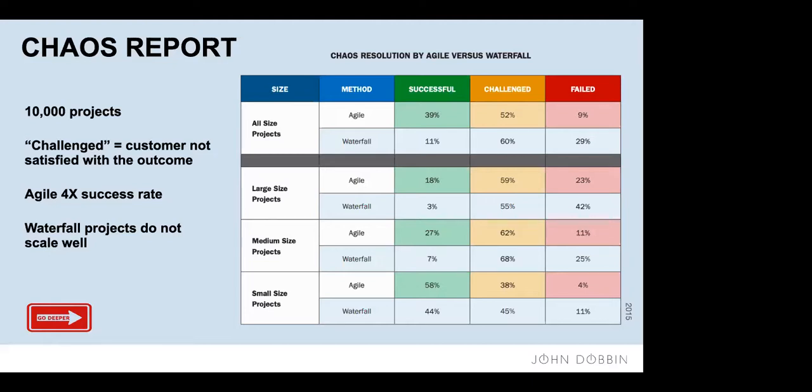And this is not a flaw, it's that the business is changing. So they might ask for some business intelligence reports that they asked the IT department to put together, and when those reports finally come together in 6 months' time, everything's changed and those reports aren't important anymore.